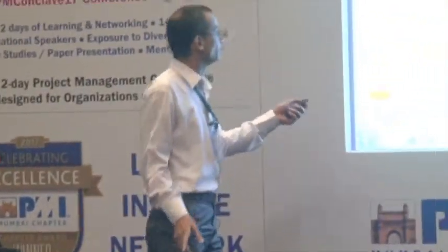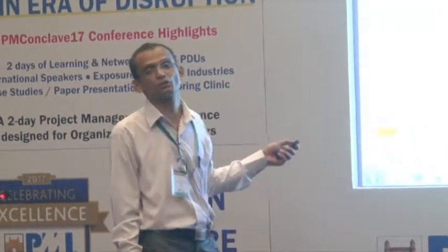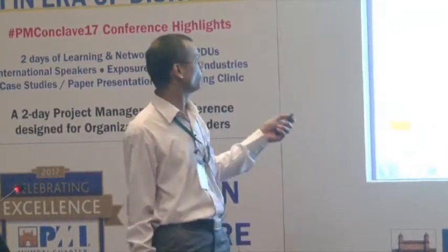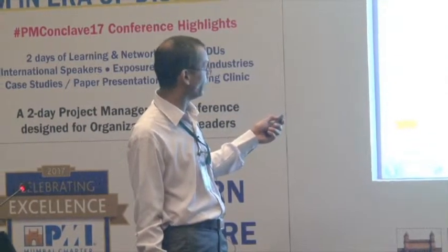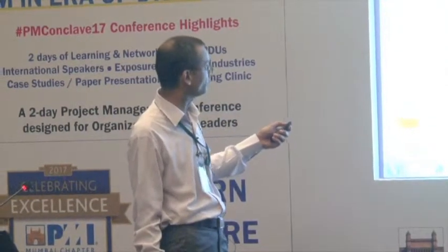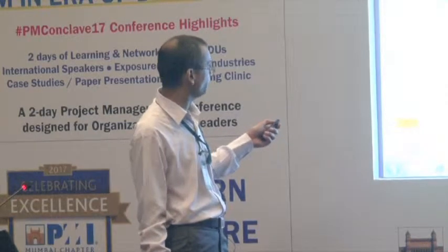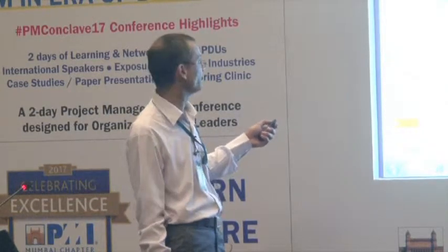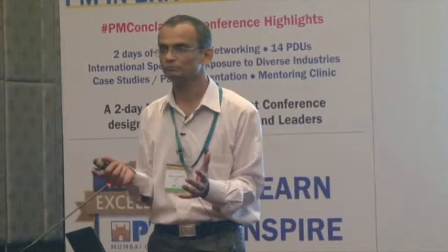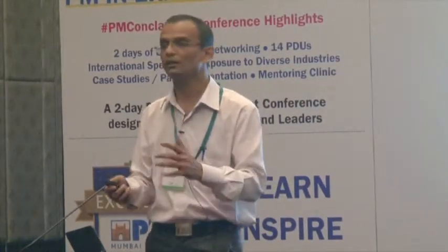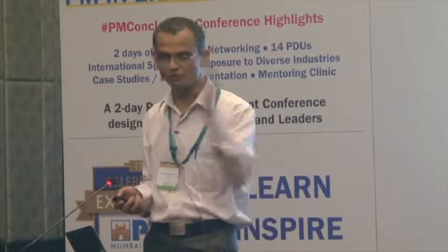Because this duration is changing based on the beta distribution. We have given the system a three-time estimate, and we have asked the system to generate durations which are beta distributed between these values, with most likely as 10. Yeah, it's a random distribution. So because we are just creating scenarios, let's say if we are going to run this project 500 times, how many times will I get a project duration which finishes within 50 weeks?